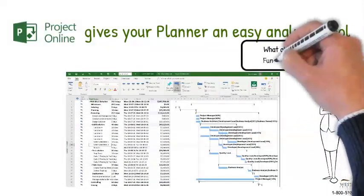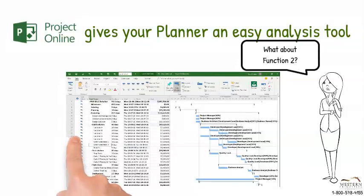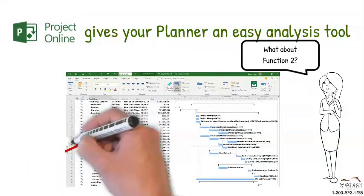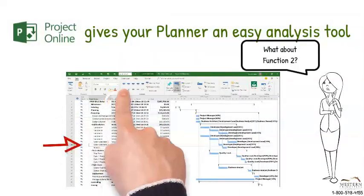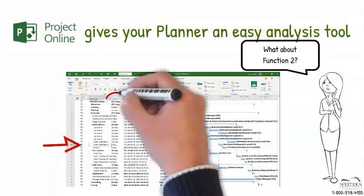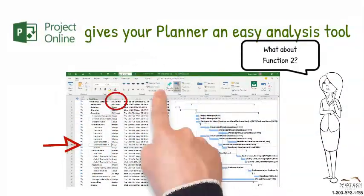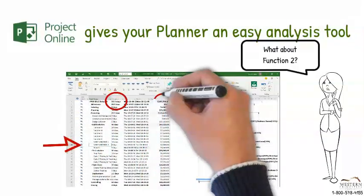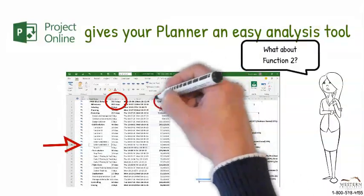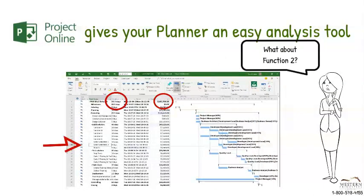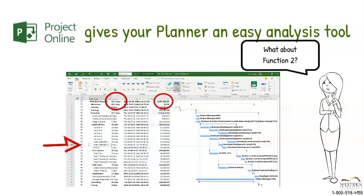With the inactivate button, you can easily see the impact of one or more changes to your plan. Also, if you have overhead activities linked into your plan, such as through hammock tasks, it will automatically push out and you can see the impact on multiple activities from one update.